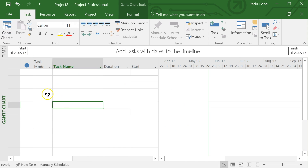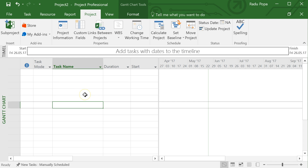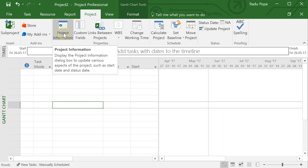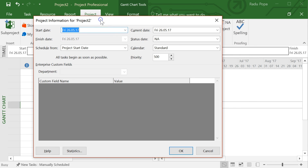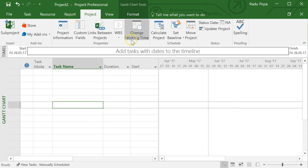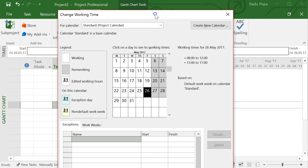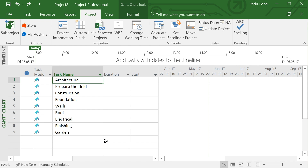Let's stick to the Gantt chart for this tutorial. Before creating any tasks, I want to define some settings about the project — for example the start date and current date. I can also define the working time; maybe I have some holidays coming up that I want to mention. There are times when you want to add your national holidays here.